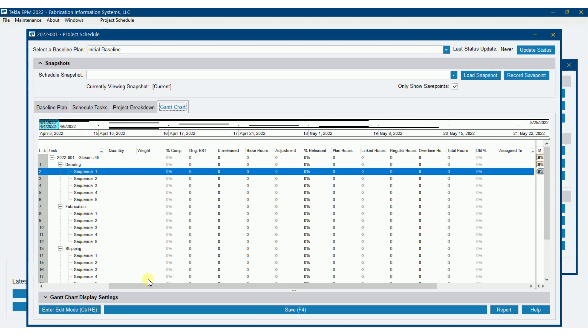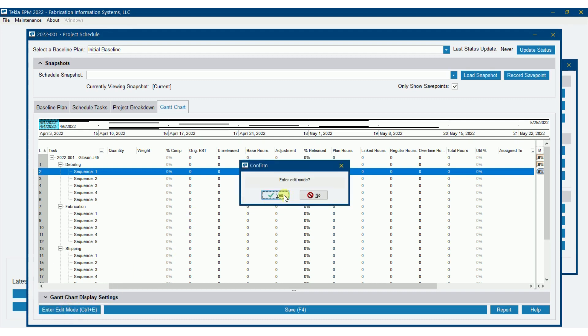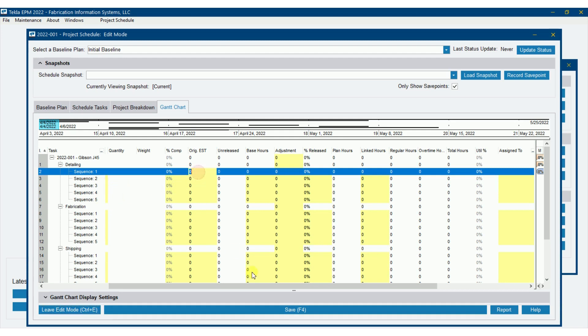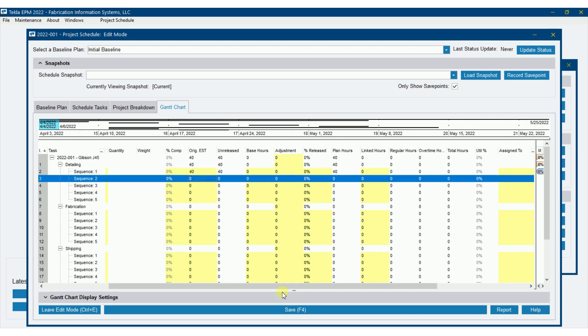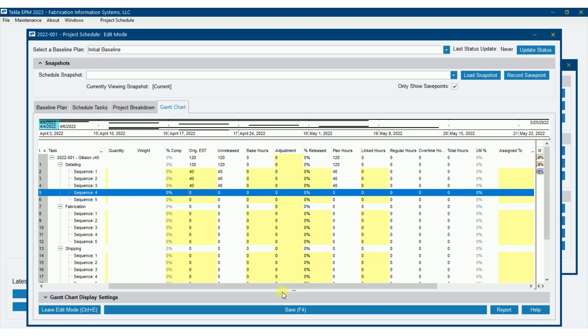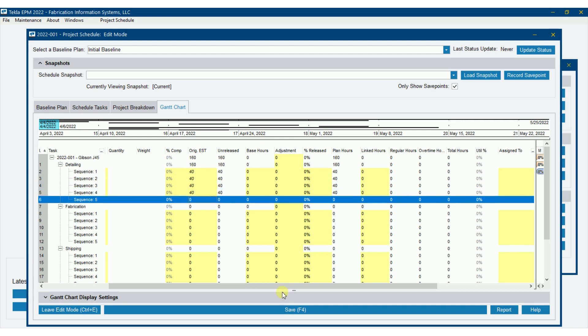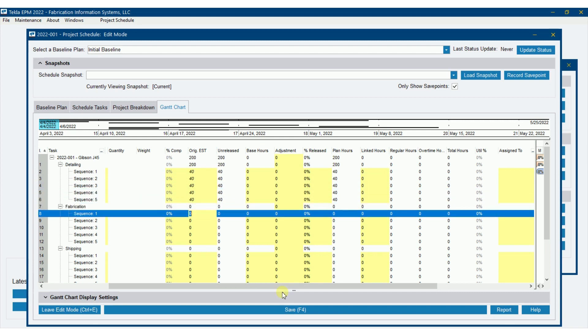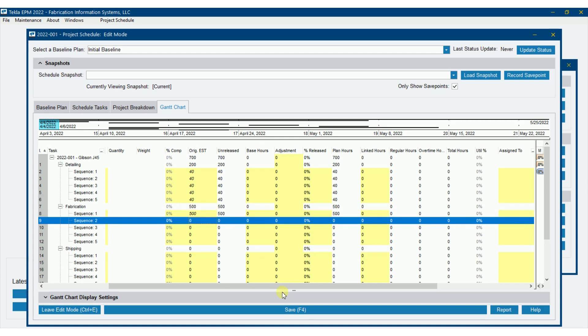Now the original estimated hours here, by the way, I'm going to turn on the enter edit mode so you can see what we can change here. Original estimated hours is how many hours it's going to take to do this particular task based off of our estimate. So I'm going to put in here, say for detailing, we're going to have 40 hours on these. We'll have one guy on it for all that time. Fabrication, maybe we say 500, 500.